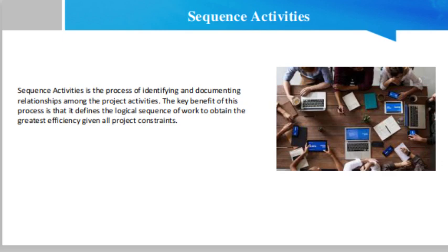Every activity except the first and last should be connected to at least one predecessor and at least one successor activity with an appropriate logical relationship. Logical relationships should be designed to create a realistic project schedule. It may be necessary to use lead or lag time between activities to support a realistic and achievable project schedule.